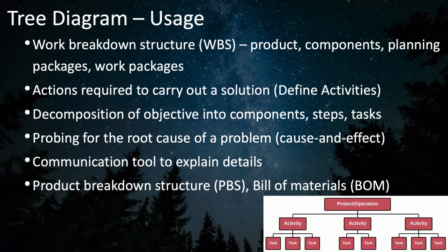On the other hand, a tree diagram can also be used while generating information, such as when creating a work breakdown structure, which will often start off with the deliverables or phases, or even a complete work breakdown structure template from your organization or industry, which you'll then fill in with your project's scope, breaking each item down into levels of greater and greater detail.